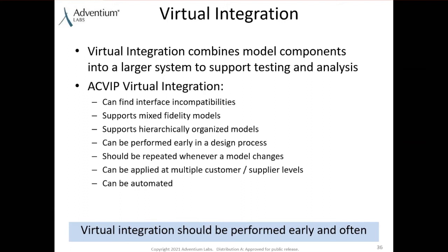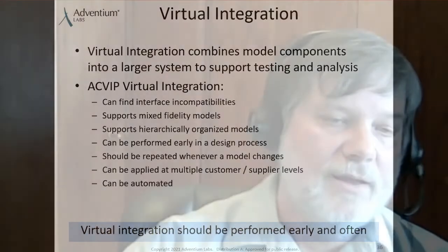We perform ACVIP early in the design process. It should be repeated, ideally, whenever a model changes. You make a change to the model, you want to run your analysis suite to see if you're still within budgets, to see if you can still verify the requirements. And to support that, the majority of these tools can be automated. And so we can do automated analysis.